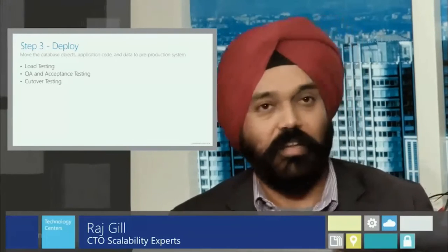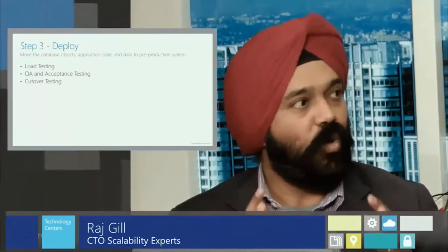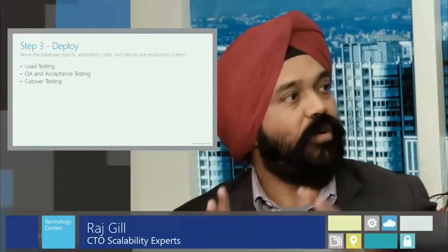Secondly, it took a whole night to run the test, so they didn't want to have the production time affected. So this was one of the tests before they did the cutover that they ran to make sure that they were all good. So this nightly process actually ran on the SQL side. Even before the cutover, exactly. So before the cutover, you want to plan for all those anomaly type of batch jobs, the ones that are not as frequent but very important, right? And you don't want to wait until later to fix issues with them. You want to make sure that before you cut over, you test those batch jobs as well.